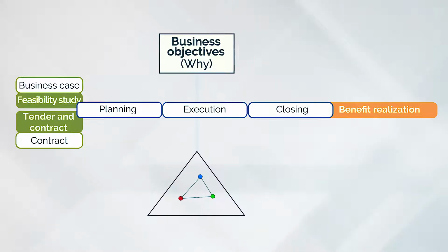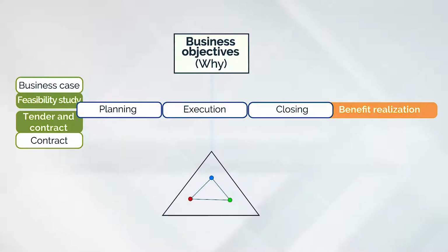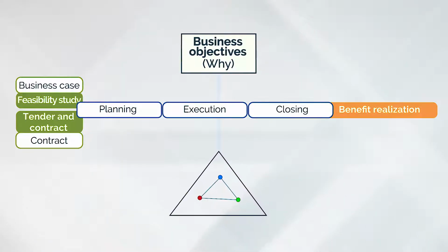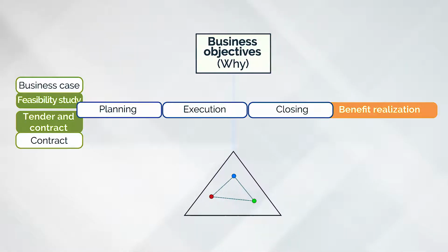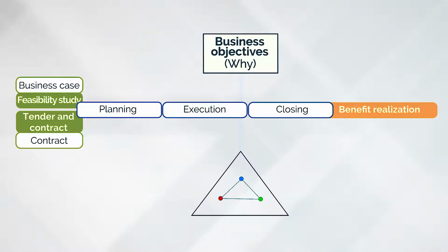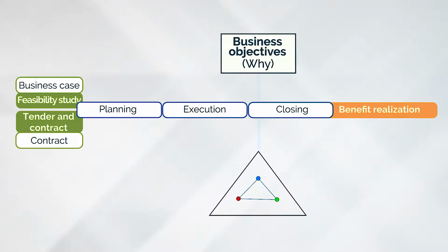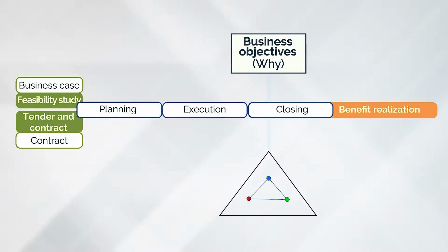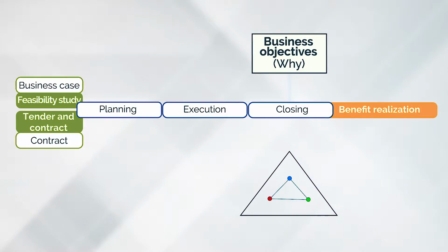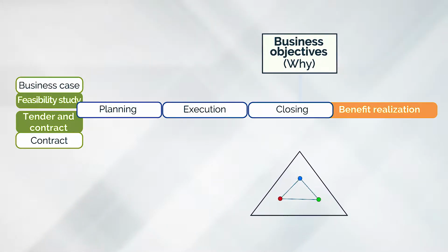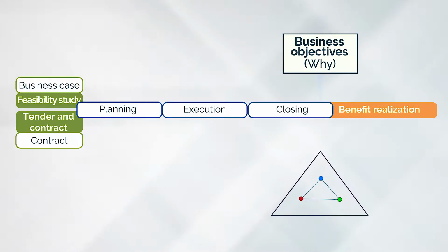Here, it is important to try to keep the triangle balanced. For example, by revising the project plan if the deviations are large, or by updating the schedule and cost estimate in the event of changes to the scope of work. When the project has been completed, we have the real deliverable with the associated real end date and final cost. This can then be compared with developments in the project objectives to evaluate the quality of the project's project management.